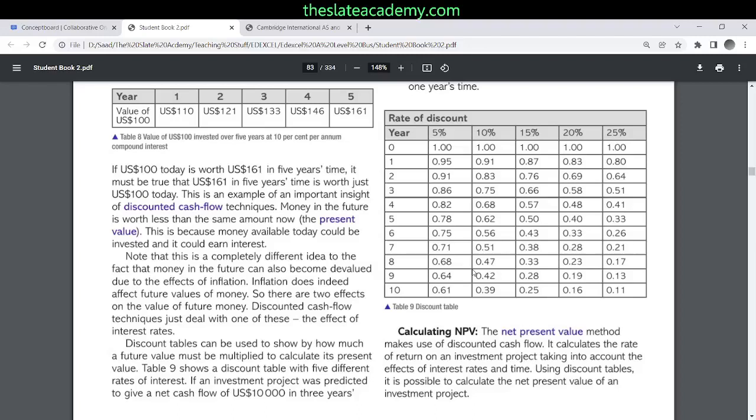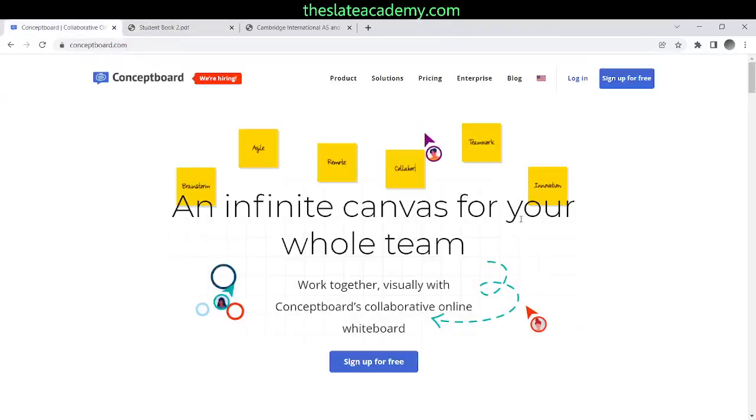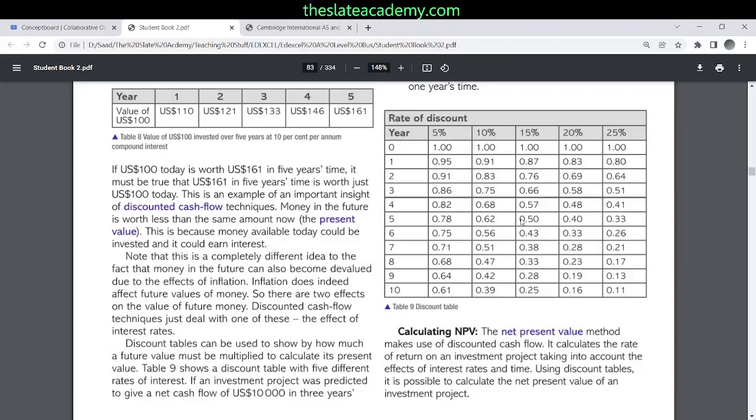Even if you are not given, shall I tell you how to calculate it? I've already told you both before how to calculate this thing, right? I don't remember. Neither do I. Okay, so for example, let me tell you how we got this value of 15% for year 5. Take out your calculator, write fraction 1 over bracket 1 plus 0.15 bracket close raised to the power 5. That gives 0.4972, roughly 0.5.